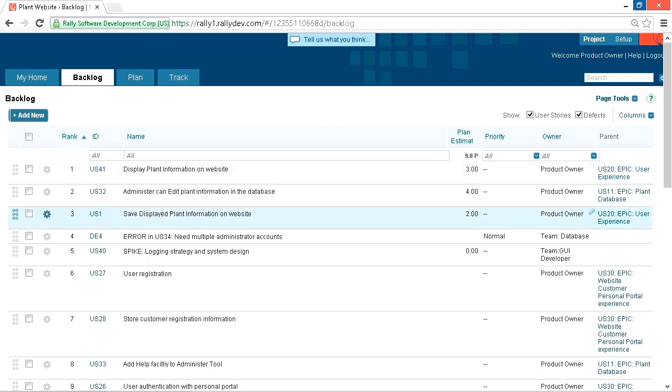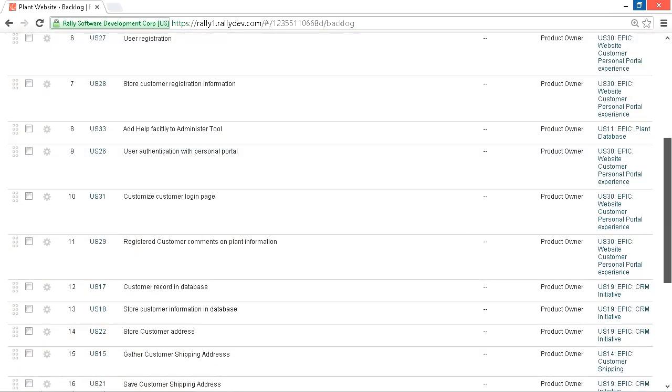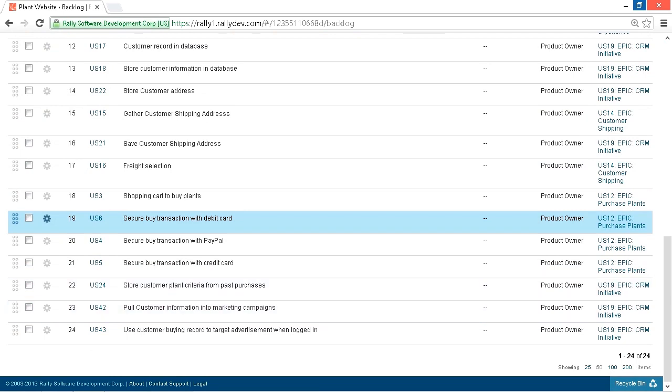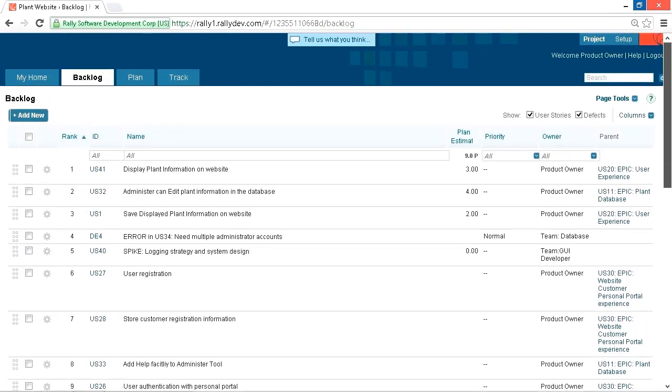Now, this makes the PBI easy to understand, easy to estimate, and enables the team and product owner to write clear, definite acceptance criteria used to determine when the PBI is done. The slices at the bottom, like we saw down here, that are very large, are hard to understand and estimate and will not be clear how to determine if the PBI is done. As they get moved up in the list, as we get more done from the top and the top of the list gets put into the sprint backlog, they'll move up and the product grooming will split them up and make them sprint ready.